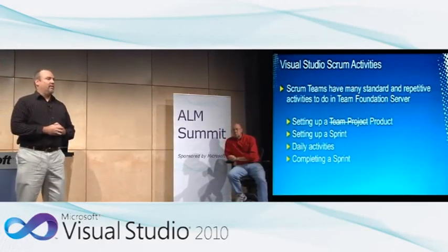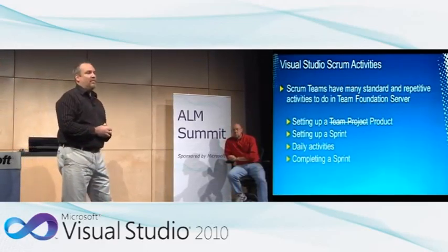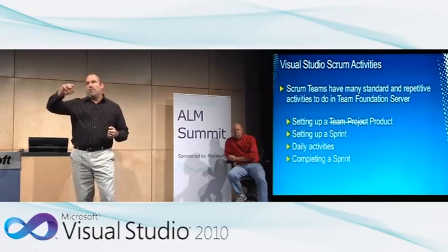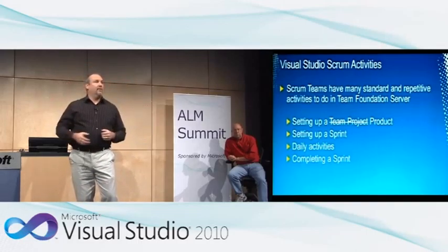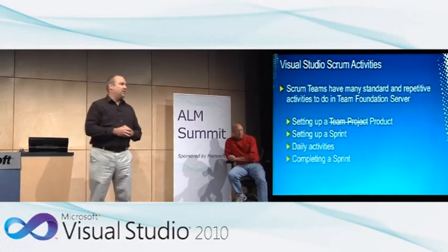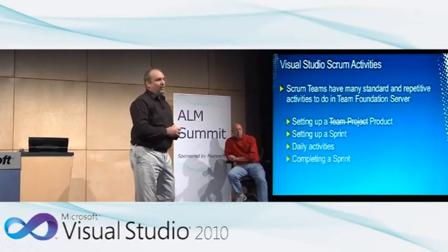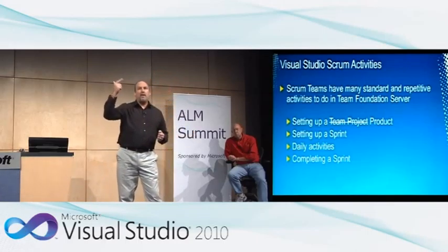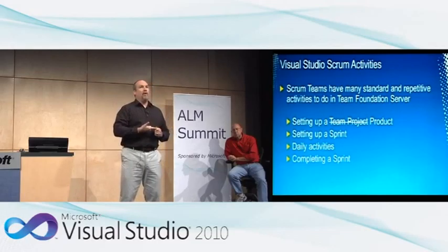And I don't know that there needs to be that tooling, because let the team decide if that PBI goes back in the backlog, or I should say, let the product owner decide if it's going to be brought into the next sprint. You pretty much got to assume, though, as a rule, that if you don't finish a piece of work during the sprint, you may never, A, go back to it again, and B, if you go back to it, the work you've done may be wasted.